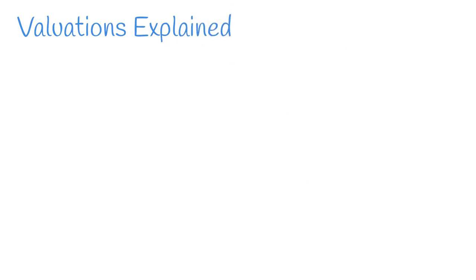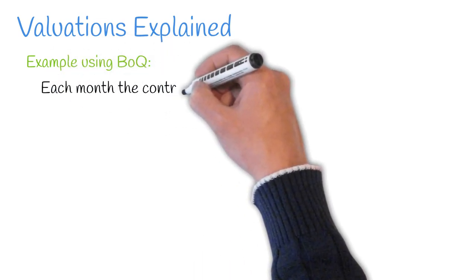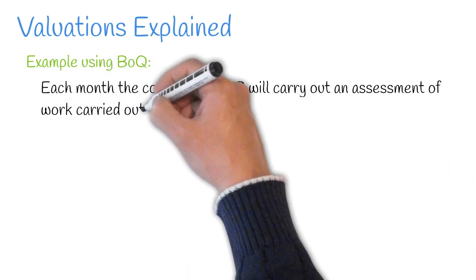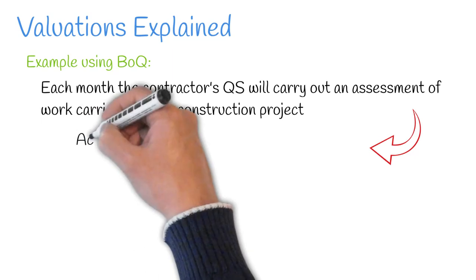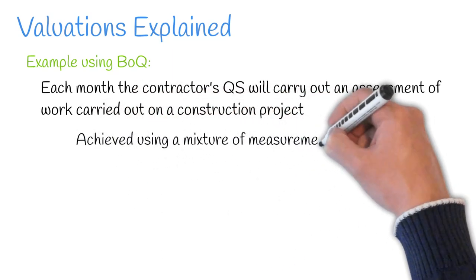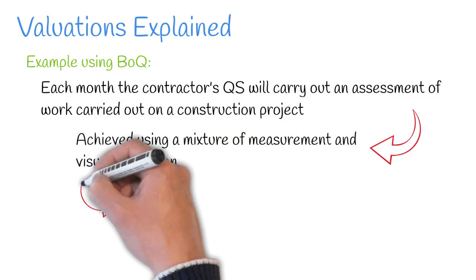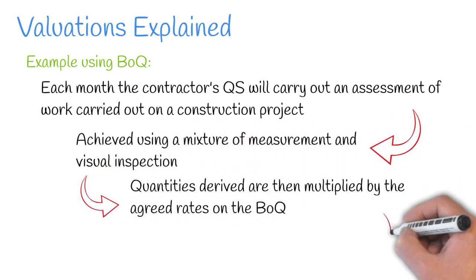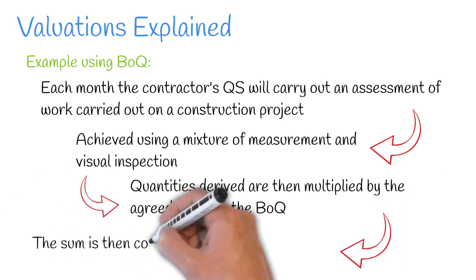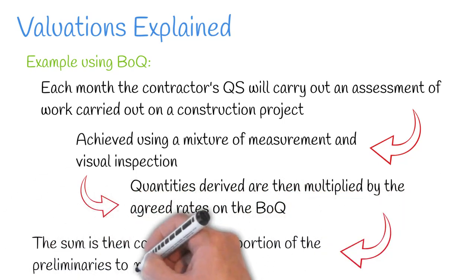We'll delve a little deeper into valuations. In this example, we're going to assume the payment method is based on assessment using a bill of quantities. Usually carried out on a monthly basis, the contractor's quantity surveyor will carry out a realistic assessment of what work has been carried out on site to form part of the valuation. This is achieved using a mixture of measurement and visual inspection. The quantities derived from this assessment are then multiplied by the agreed rates on the bill of quantities. The sum is then combined with a portion of the preliminaries to make up the external valuation.